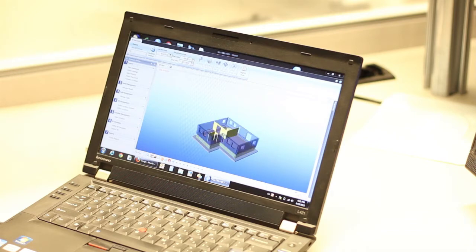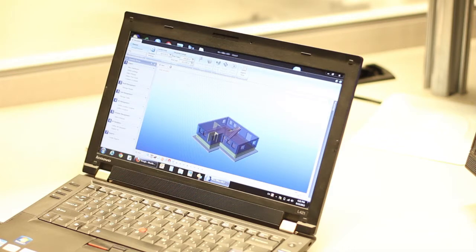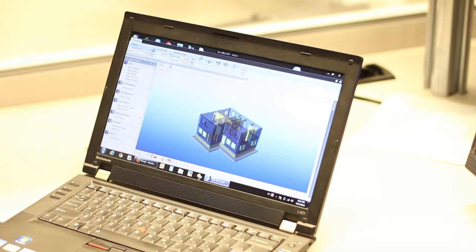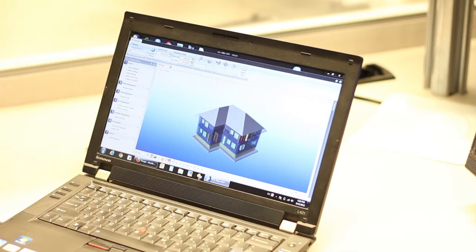Then the exterior walls of the first floor, interior walls, and then the floor for the second floor. Here are the exterior walls and the interior walls for the second floor, then the windows and doors. Later we build the stairs and the roof. That's basically the 4D simulation — a very simple model to show you the concept.